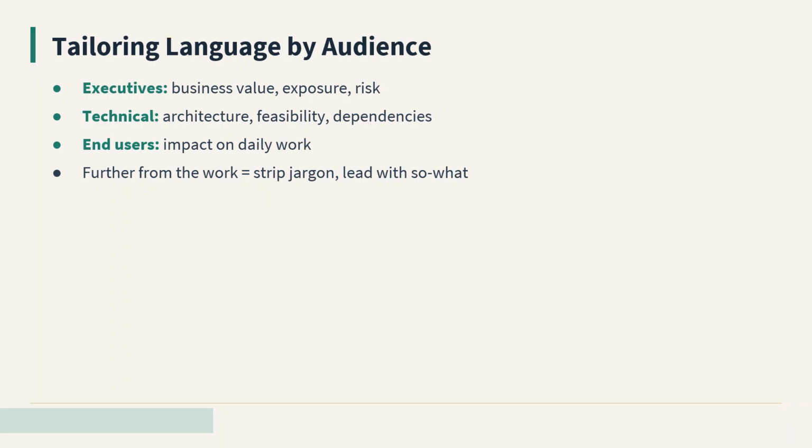Executives respond to business value, financial exposure, and risk. Technical stakeholders respond to architecture, feasibility, and dependencies. End users respond to impact on their daily work and the benefits they will see. When you write the same status with 3 different framings, you are not being redundant. You are doing translation work that most project managers skip and then wonder why their audience is disengaged.